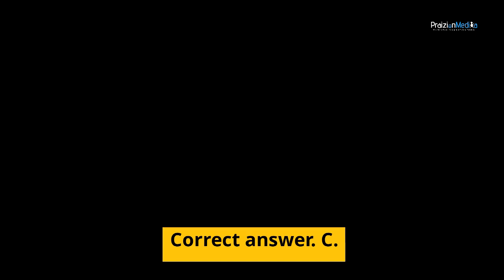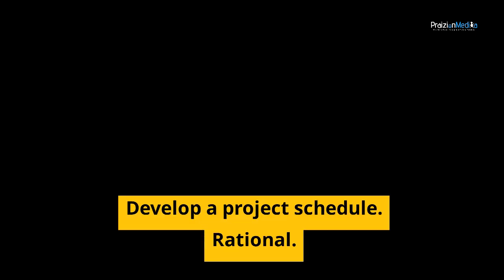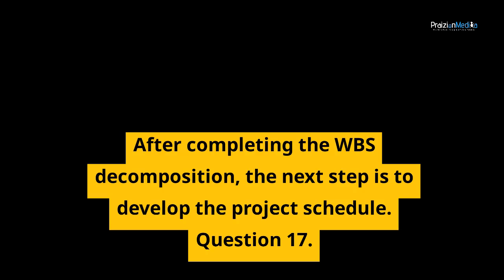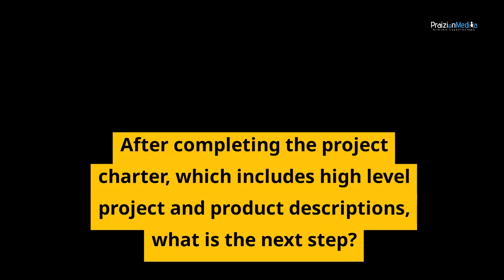Correct answer C. Develop a project schedule. Rationale. After completing the WBS decomposition, the next step is to develop the project schedule. Question 17. After completing the project charter, which includes high-level project and product descriptions, what is the next step?